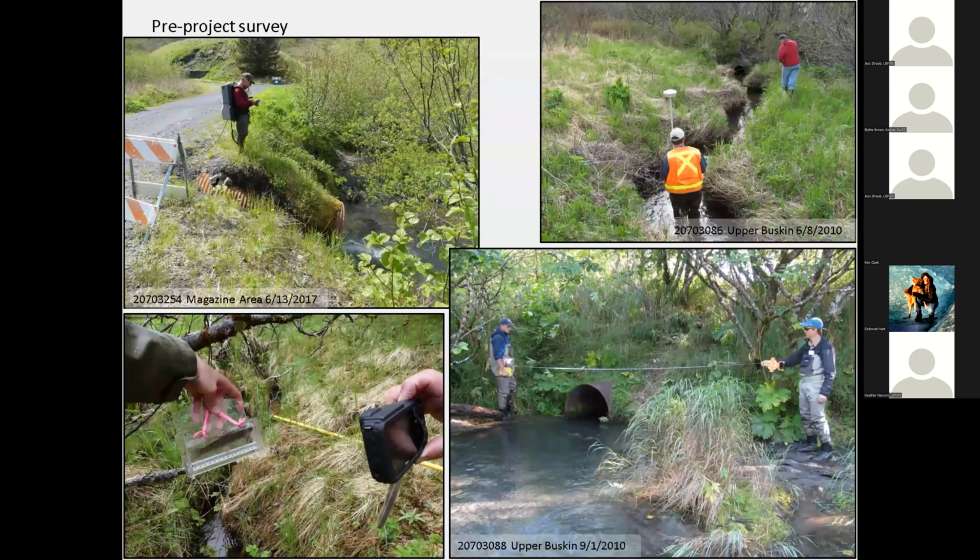Do your own survey. When you walk the site to determine fish passage needs, add an awareness of the vegetation into your list of site conditions. Pre-project surveys can let you know what to be prepared for. Don't just look at the fish and channel structure, identify plants too. This would also be a good time to identify potential veg mat sources.